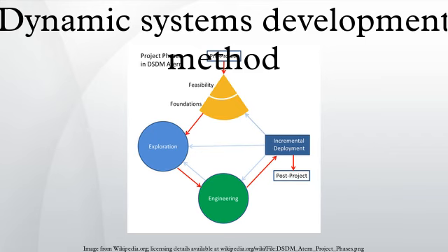Acceptance of the outturn philosophy before starting work. Appropriate empowerment of the solution development team. Commitment of senior business management to provide the necessary business ambassador involvement. Incremental delivery, access by the solution development team to business roles, solution development team stability. Solution development team skills. Solution development team size. A supportive commercial relationship.